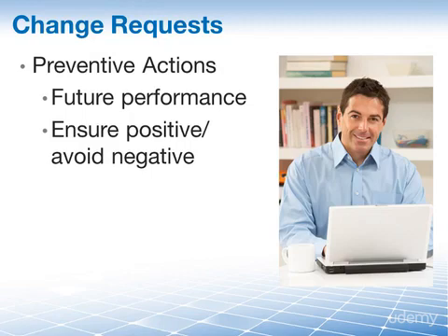An example of preventive actions would be spending for extra server space and buying document management software to maintain project files. This enables the project team to perform their work without interruption and prevents them from losing or having to redo any of their work due to lost files.